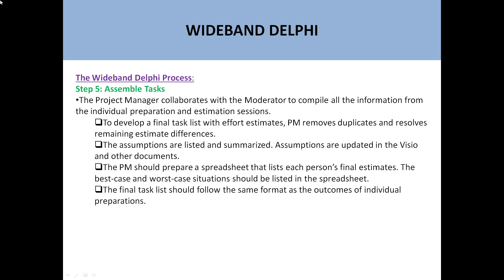Then comes the assembling of tasks. The project manager collaborates with the moderator to compile all information from individual preparation and the estimation session to develop a final task list with effort estimates. The PM removes duplicates and resolves remaining estimate differences. Assumptions are listed and summarized. The PM prepares a spreadsheet — like an Excel sheet — listing each person's final estimates, with best case and worst case situations. The project manager assembles all the tasks into one sheet to get an overall estimate for each task.